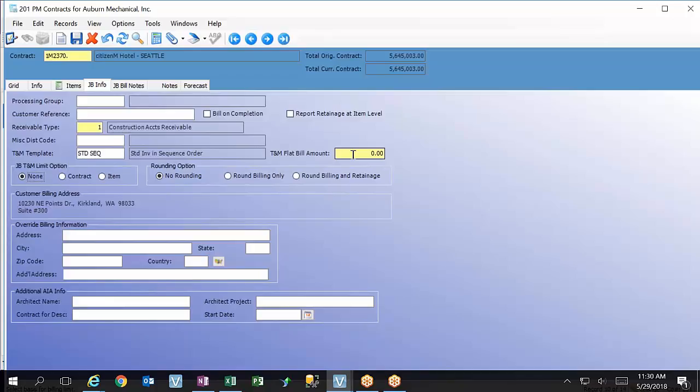It does. We want the ability to have bill rates that you use predefined, and then possibly have the cost side of it have either fixed rates or actual rates, depending on what the contract will support. Yeah, and it ignores those if you're doing a bill rate on the T&M side. All it cares about is the number of hours that came over. It looks at the craft and the class and says, that belongs to this labor category, that's the rate I use per hour. I can override it by employee in some other ways, and it's pretty nice. So that's where you put the template if you're going to use one.